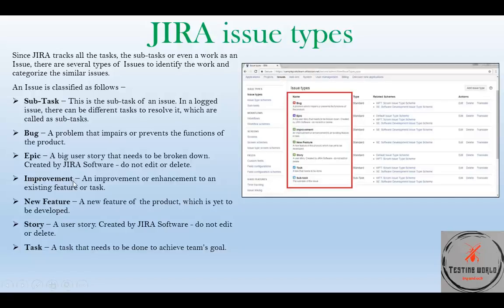Improvement or enhancement is a specific issue type used for creating suggestions — like when you want to improve some functionality. You create this improvement or enhancement and describe what exactly you want to improve. You can assign this task to a responsible person who can accept or decline it. New feature is a feature that needs to be developed. Story is a user story — usually an epic needs to be divided into a few user stories related to that specific epic. And a task is something that simply needs to be done.